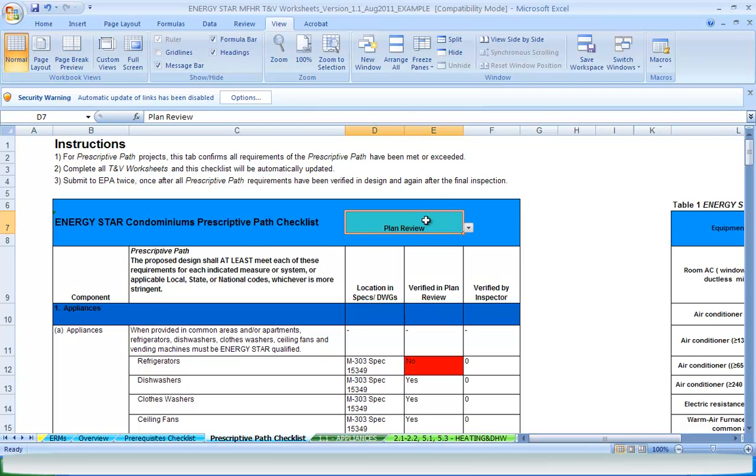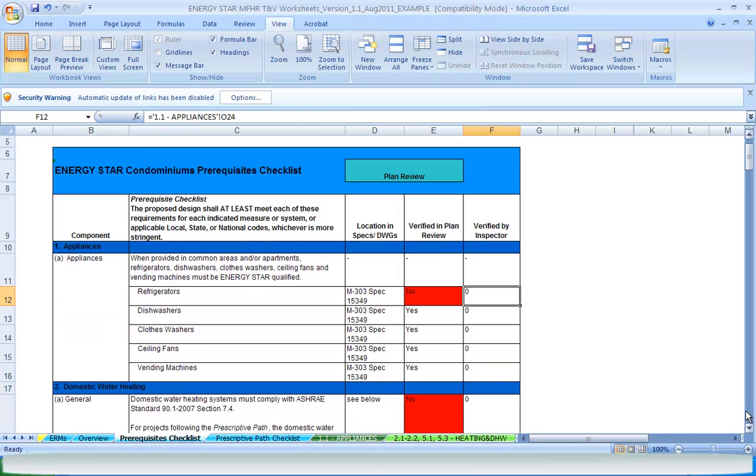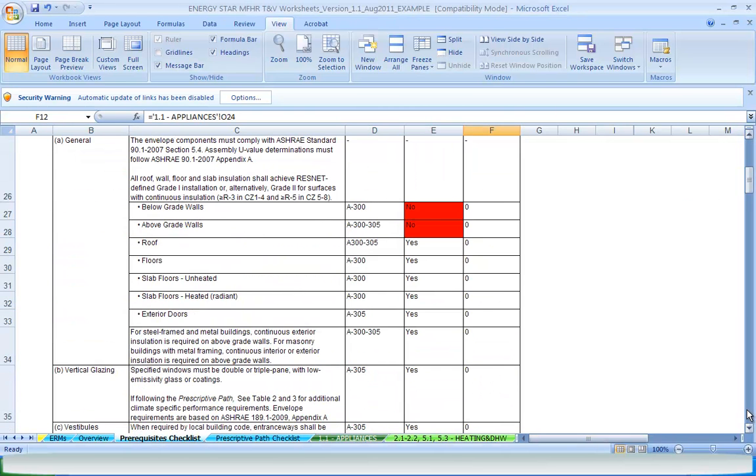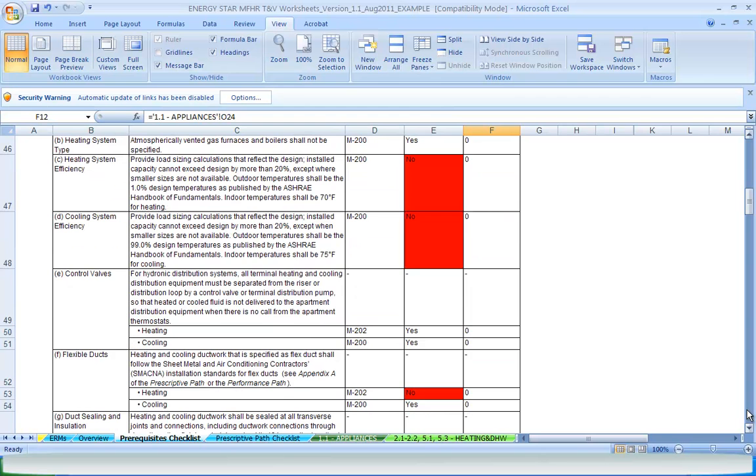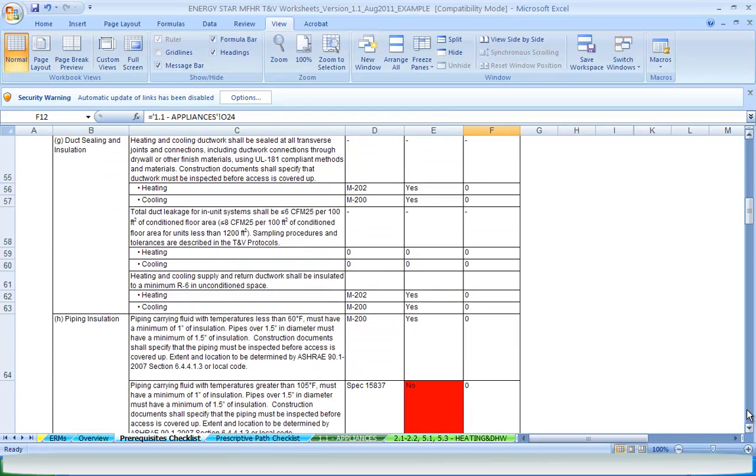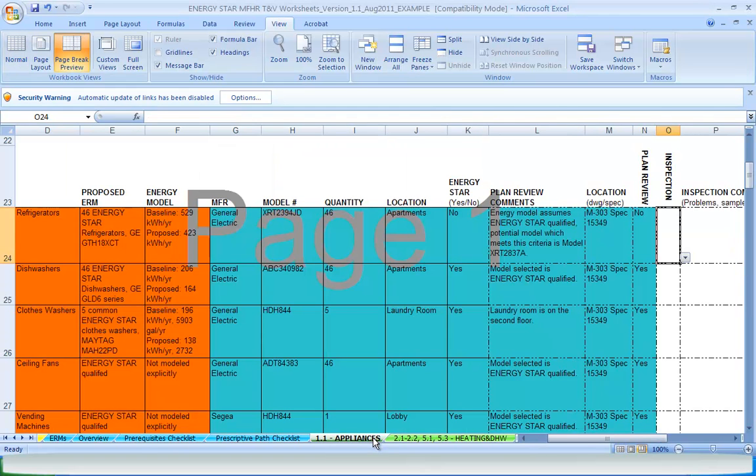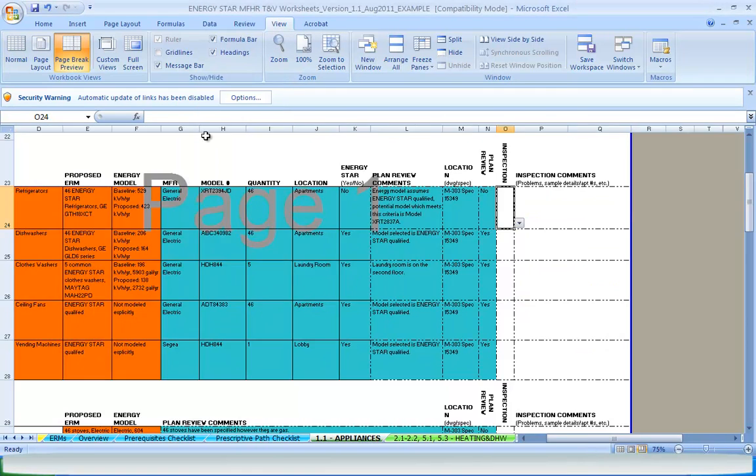For both, you should select which stage of the project you are at when submitting to EPA. But before submitting the worksheets to EPA, it's important to review the applicable checklist to confirm that all prerequisites or prescriptive requirements have been verified. After the final plan review confirms that all recommendations have been integrated into the construction documents, the TNV worksheets are intended to be printed and brought in the field.